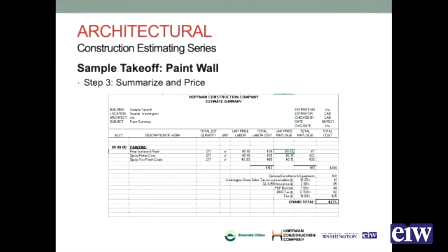I know that oftentimes on some of our projects, we will talk with the owner to make sure that when we bid out both drywall and painting work, we'll have an allowance set in the bid form that says, here, we're going to have $5,000 for unallocable trade damage. So you're covered. Everyone tried to do exactly what they were supposed to, and we don't know who did it. Everyone was being careful, and it got damaged.